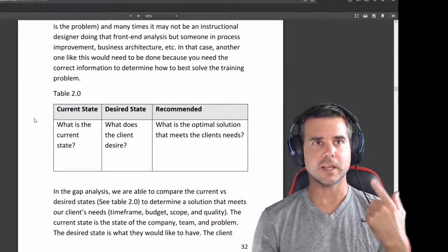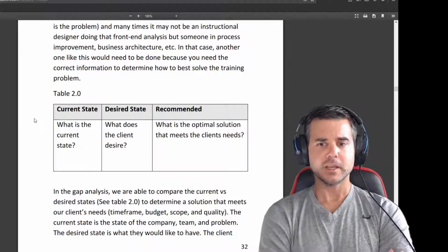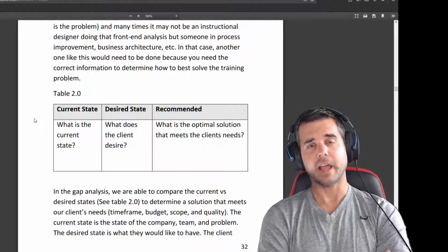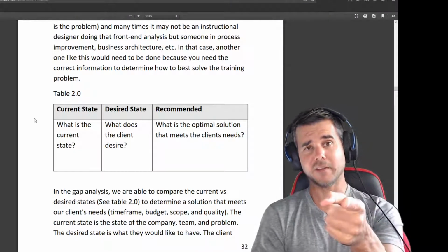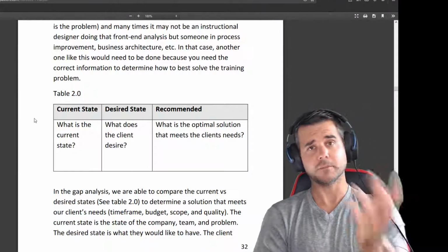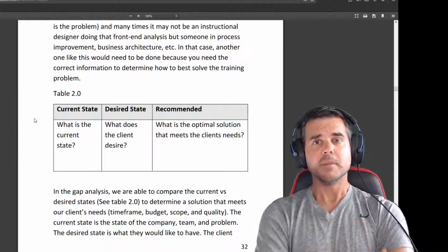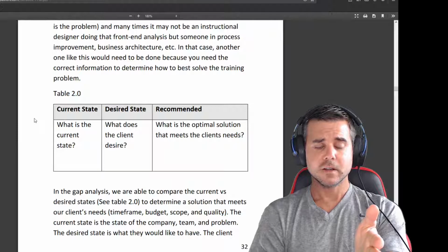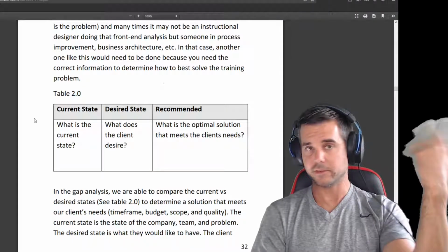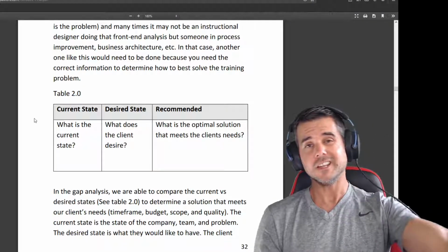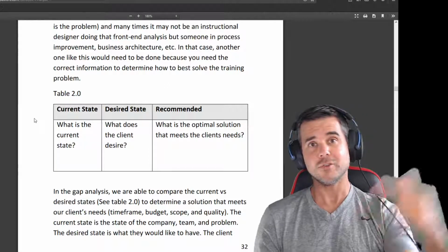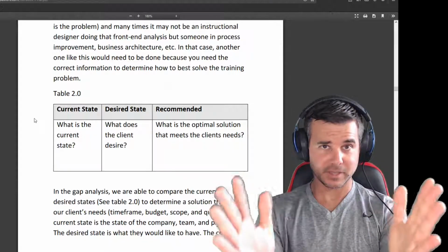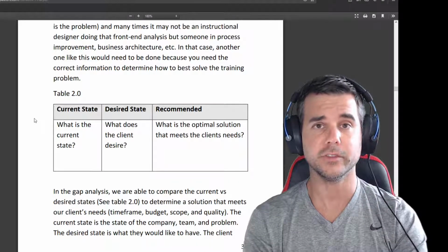Because if they're mentioning e-learning modules to me, I'm thinking, okay, I could develop this in Articulate or Captivate, but does my client have a copy of Articulate or Captivate or Camtasia or whatever I'm using? If they don't have a copy, that's another thing I'm putting in my budget, because they need a copy so that they can edit it. And then do I need to train one of them how to use it? So I'm thinking about all this stuff during a 60-minute conversation.